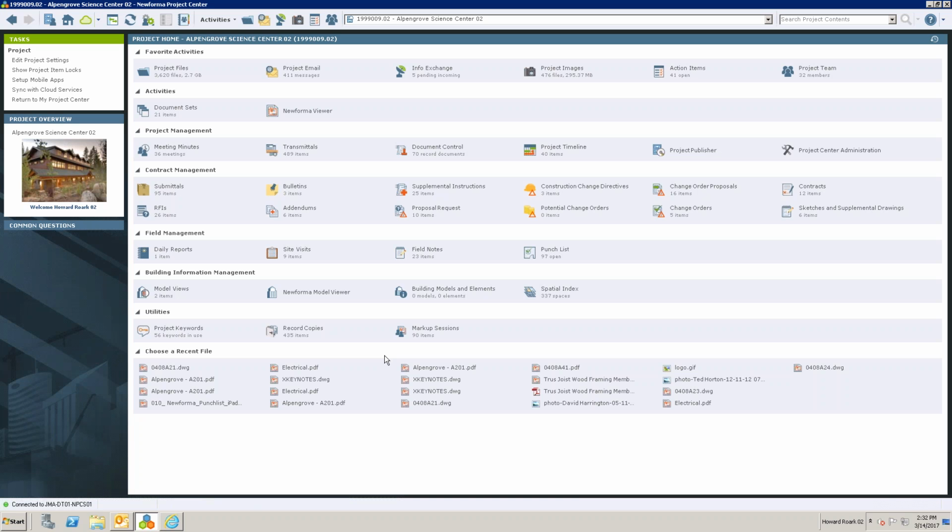So you do have the ability to come in here and view old information, to view the old project files, to view the old project email, view any of the information that's associated with the database like time and date stamps, etc. We're not touching or moving any of that data because where it lives is on your shared drive. What we want to stop is people from adding new information into a project that's associated with an archive. So you can always take a project and activate it again, make it active, add something to it, and then archive it back. But if it's in an archive state, it is read-only.